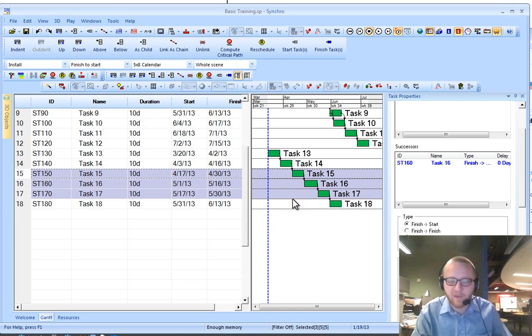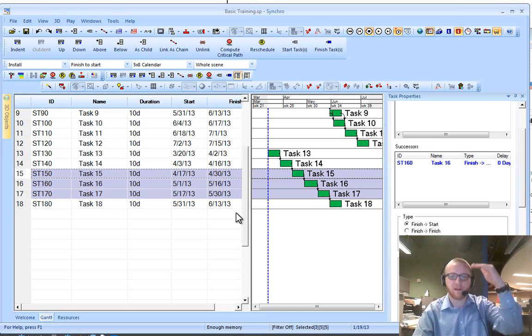This can be good if you have certain areas phased, and say your drywaller is going from area A to area B to area C, and then an issue comes up and they have to go from area A to C to B. As you know, that sometimes happens. You can delete all that logic and then relink in the proper order.